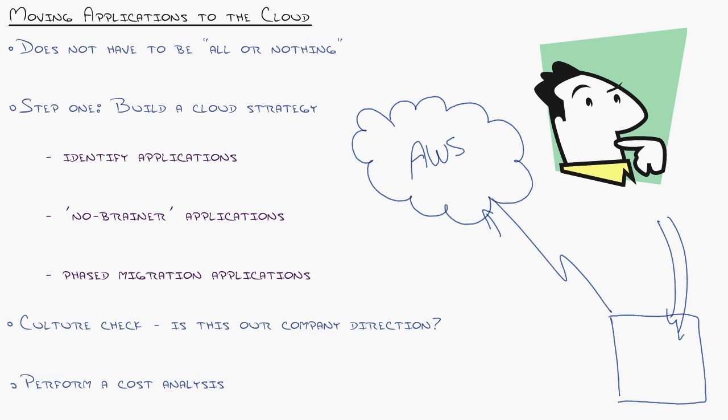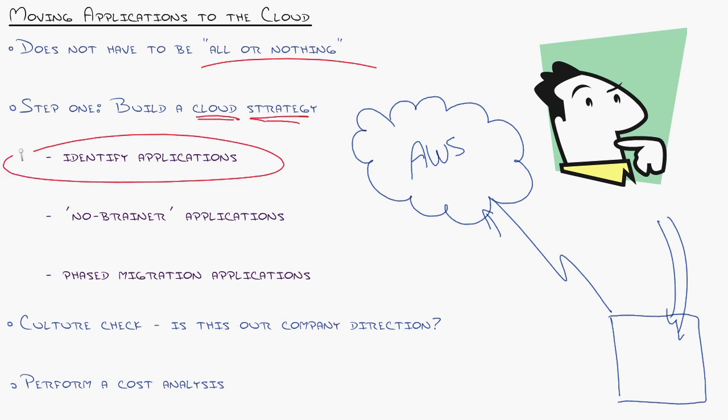Well, first off, realize it does not have to be an all-or-nothing sort of move. CBT Nuggets, which is the company I train for, has moved their entire infrastructure to run out of Amazon Web Services and it took them more than a year to do that. What they did is number one, build a cloud strategy — that means to identify the applications that you want to move. Those applications can be broken up into many different pieces. The no-brainer ones are the ones that you want to move first.